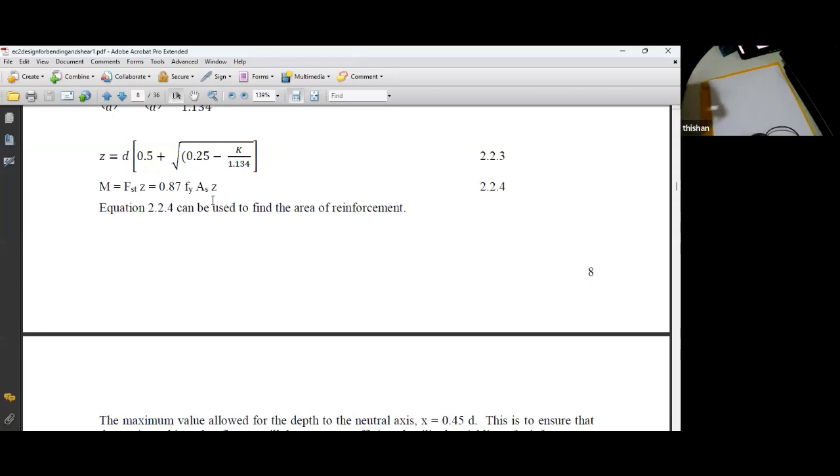The contractor also gets 500 million. The fee of the value engineer is 100 million, 10%, so the value engineer gets 100 million. The contractor gets a profit of 400 million. So without doing a single thing, by doing value engineering, the contractor gets 400 million.